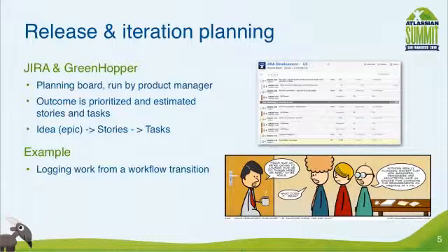And then the release planning basically is turning those epics into stories and allowing everybody to participate in the prioritization of the stories that we're creating, and then story pointing those things. And then, of course, we come back together again for the iteration planning, where we turn those stories more into tasks, and we actually give them hour-long estimates.